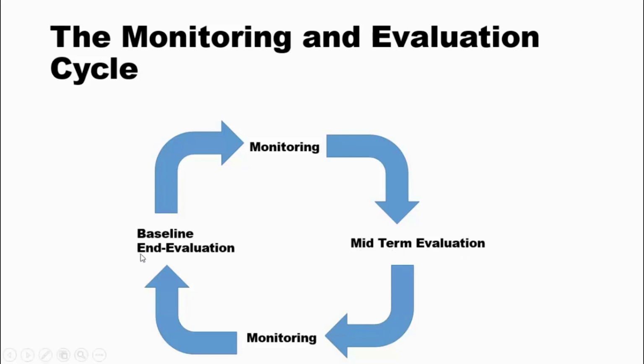So now, if you've noticed, the end of project evaluation and baseline, they are together, all right? What some organizations have done is that they'll use the end of project evaluation as a baseline for the next implementation phase of the project.